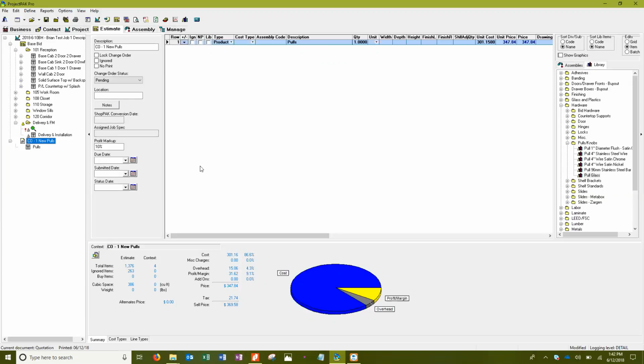Would you kind of do the same thing for like sheet goods? Like say they're changing from a Corian C series to Corian A. You put all your Corian C square foot in and then put your A in. Sure, if that's the only thing changing, then by all means, that's an easy way. You look at that line type analysis, tells you exactly what you quoted it as before, and just pull that number in again. Very simplistic, because you're looking at everything.